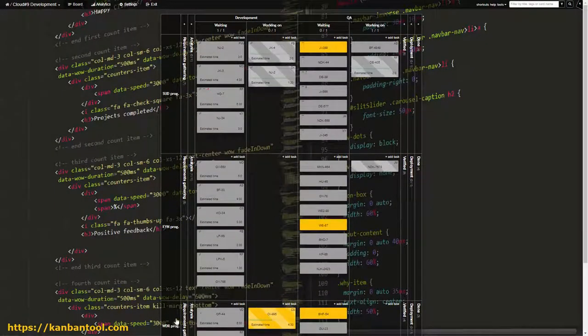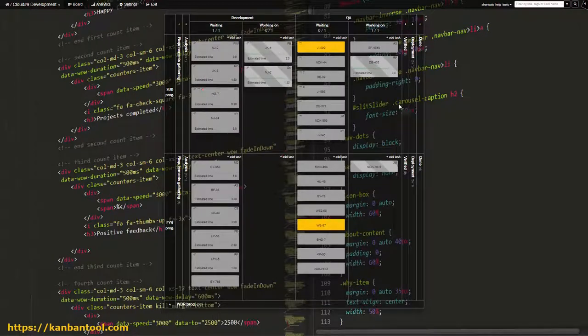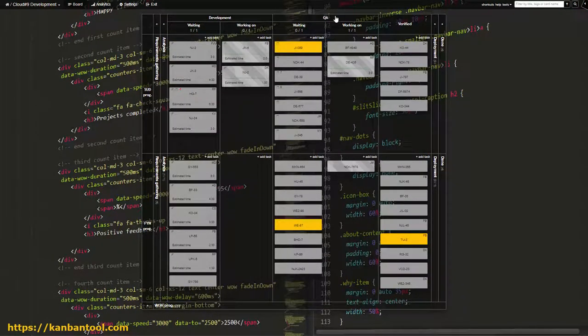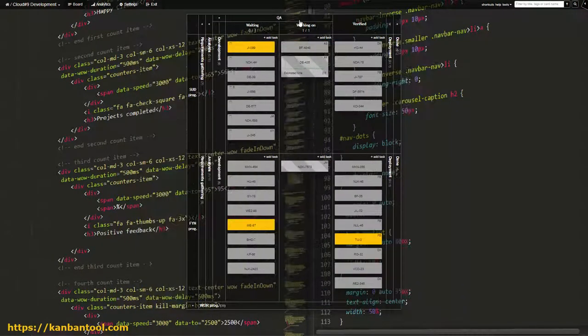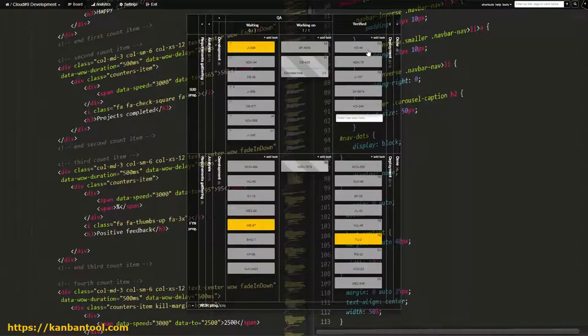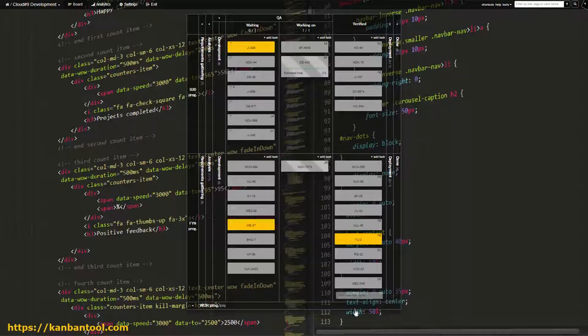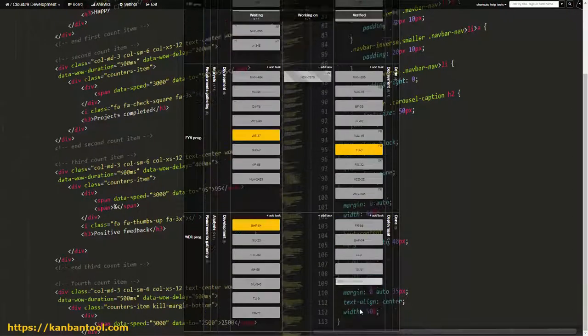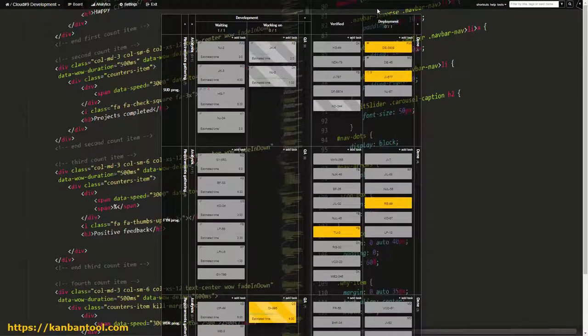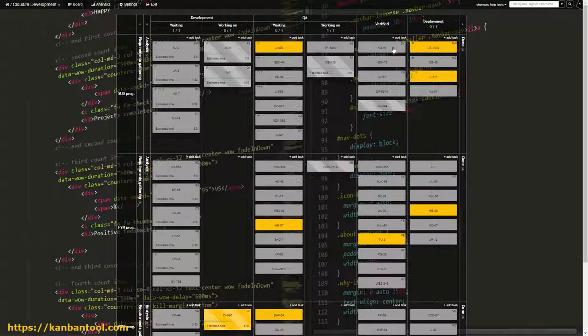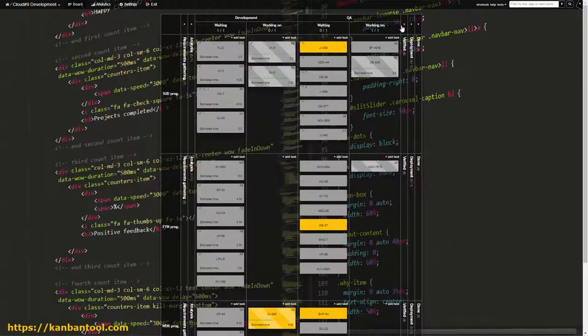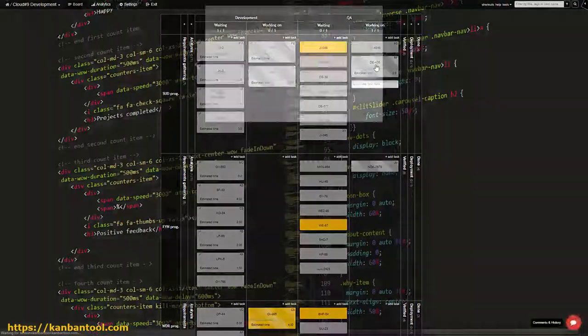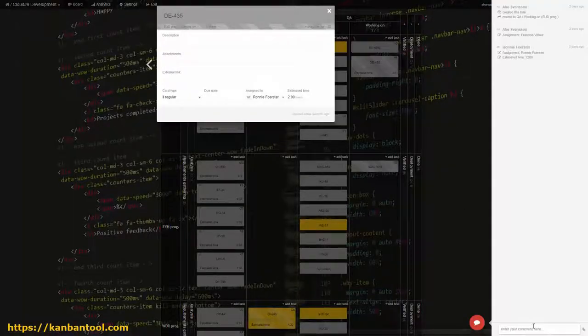If tests prove the items to work correctly, cards can be moved further right into Verified. But, if the work presents bugs, cards are reversed to development and start their journey once more.